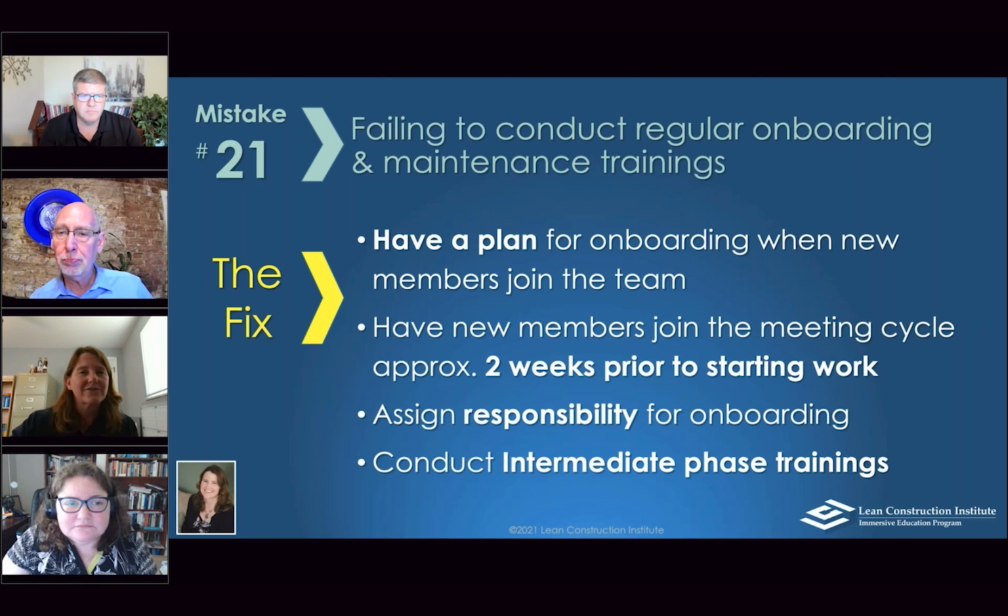There are others that are out there that are probably one-offs or don't come up very often. And that's why it's so important to create that vision of where you're going to be, so that instead of trying to say, hey, do you need any permits? Do you need any RFIs? Do you need any submittals? Instead, you're saying, you're going to be doing this work. Can you? And what would stop you from being able to do it? And that's kind of how you shake that tree and get those things out.